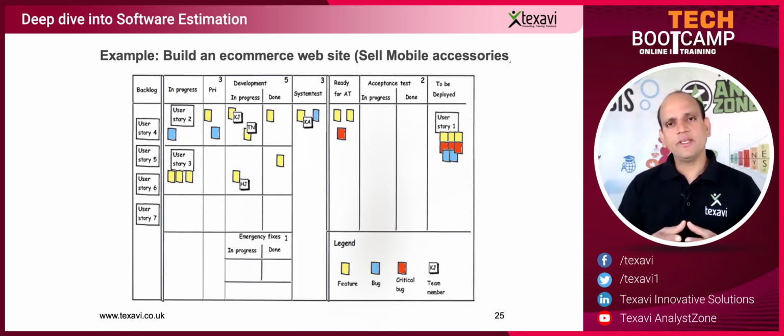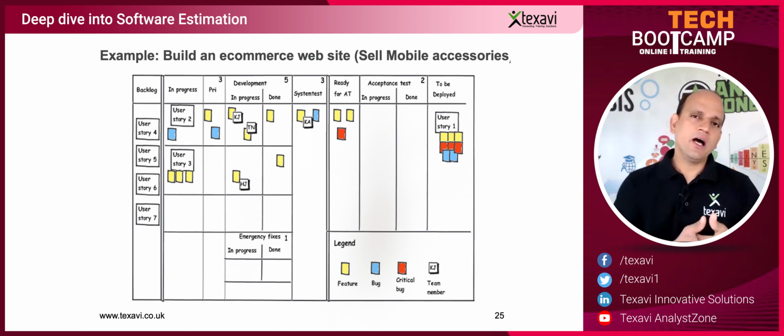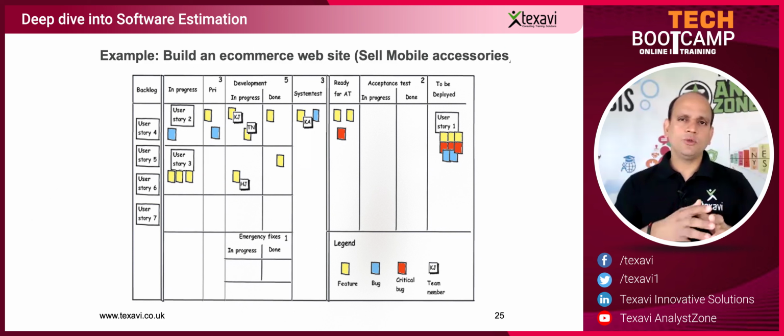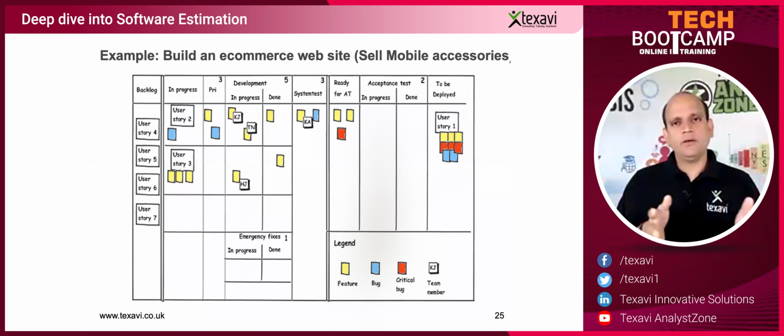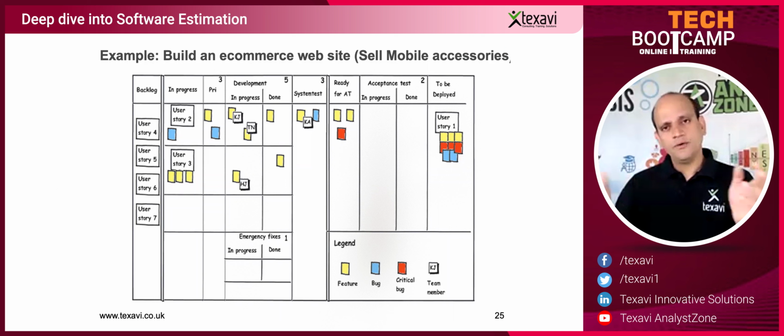So now we do estimation pretty much every sprint. During the sprint planning, after the sprint planning is completed, once you have a look at the sprint review, you look at how you've done. The sprint retrospective is when you could try and see whether your estimates are way off or too tight. So you can then accommodate that. You can try and adjust your way of working in such a way that you optimize your estimation as a technique, as a team exercise.